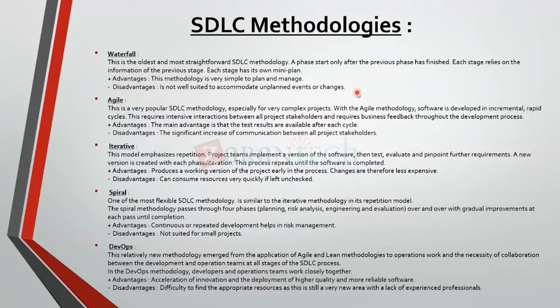If somewhere in between the business requirement changes, or you have forgotten one business requirement, then you need to go back again to the build phase and do it. So it is difficult to accommodate.